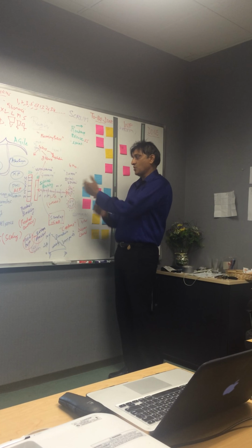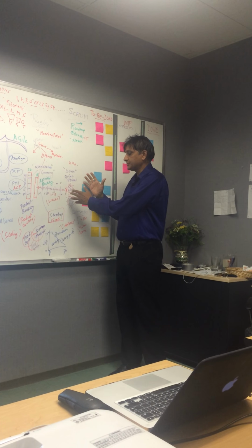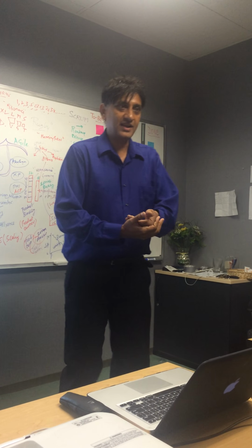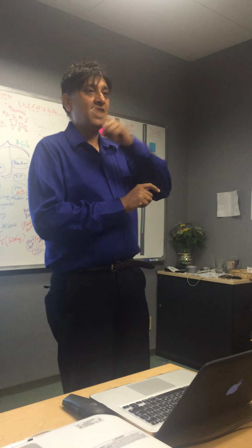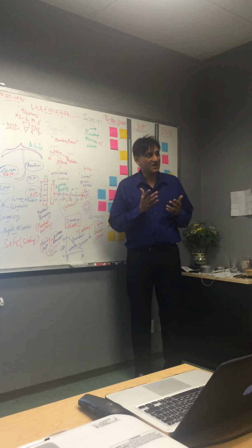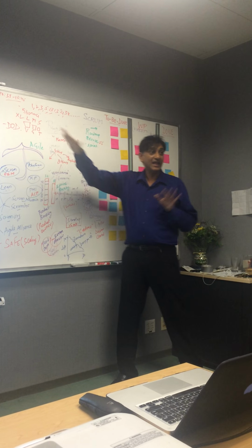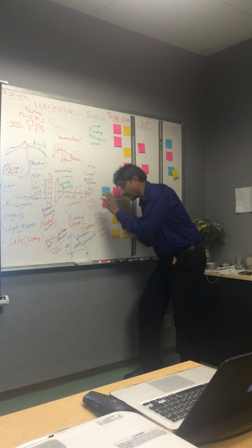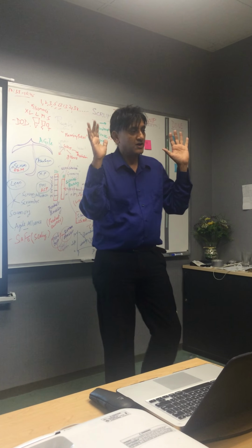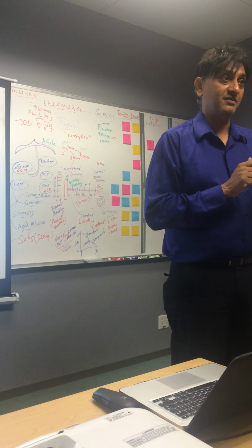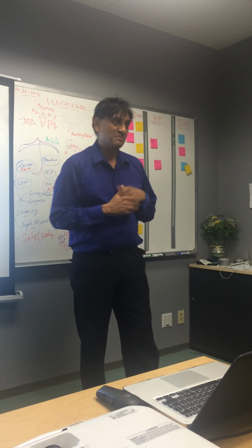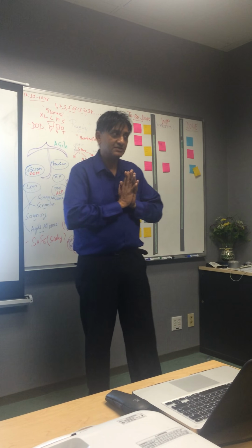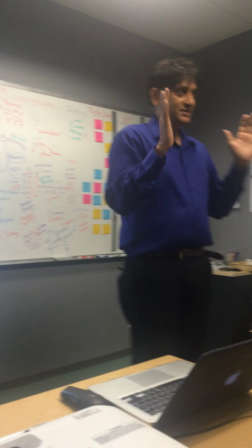And when it's done, we review what's happened. We demo the product to the stakeholders, and they either say yes or they say no. Some of it they say yes, this is ready. Some of it they say, this piece not really ready, take it back. So it comes back to the product backlog, and we work on it. Based on the definition of done that we have defined and the acceptance criteria, we demo it, and the stakeholders accept it. Then the team gets together and reflects and retrospects and thinks what's going right, what's not going right, and figure out what to do better. So in the next iteration, like Shivani was saying, we improve it, right? The goal is to improve our cadence, our velocity, our rhythm, right? Much like rugby teams, where excited individuals and professionals build the system.